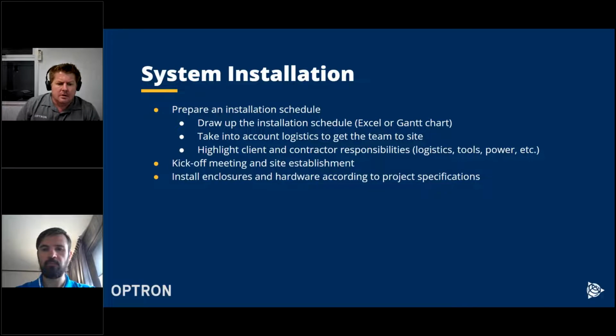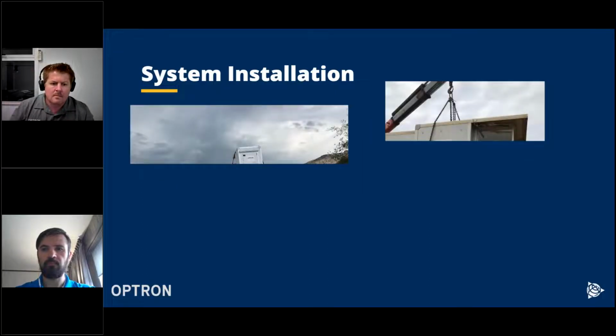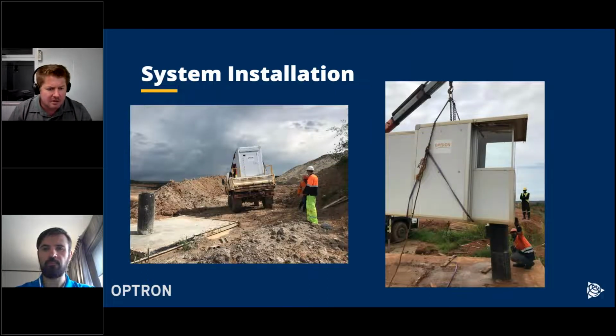So then we'll install the enclosures and hardware according to the project specifications. Sometimes it takes a bit of work to do this, especially the big enclosures. You will need to have a truck with a crane so that you can lift it up, because that needs to be lowered over the monitoring beacon.